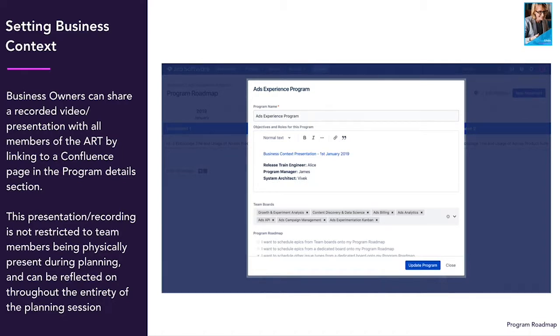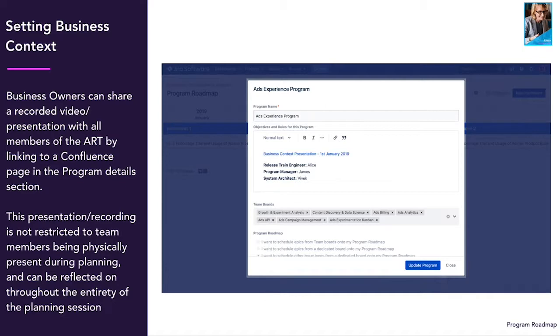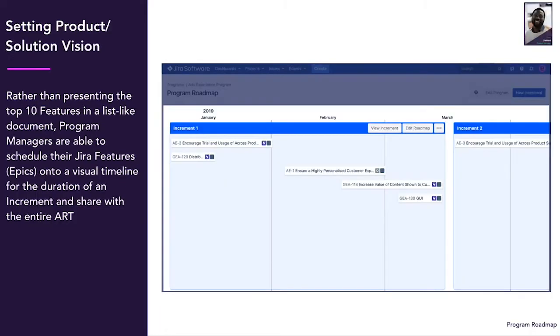Before PI planning, we recommend recording a video of the business owner reflecting on the business context. You can add the video to Easy Agile programs for everyone to see and refer back to it throughout the increment.